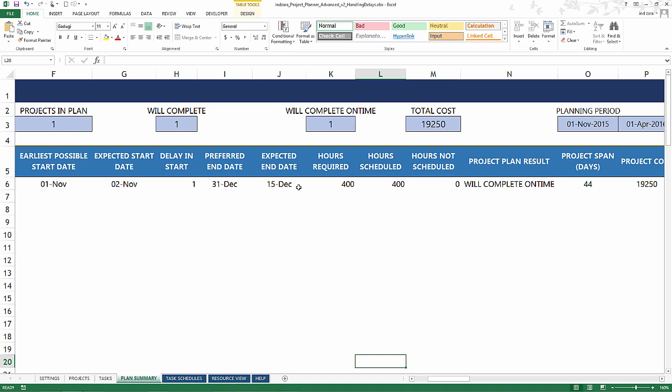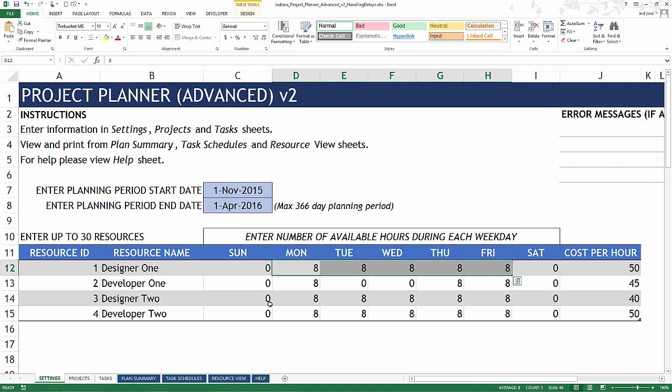So clearly what we have done is increase the chance of the project completing earlier. Very straightforward: increase the availability of the resources. Increasing the resources means that you need to identify which tasks are delayed, find out which resources they are assigned to, and then identify which resources have more availability and reassign the tasks. That's what we did, very simple. In the next video I will be talking about a slightly more complex scenario where predecessors are involved. In this simple example in this video we didn't have any predecessors. The two tasks were completely independent. If you have any questions or comments please leave them in the comments and I'll definitely get back to you. Thank you very much for watching the video.